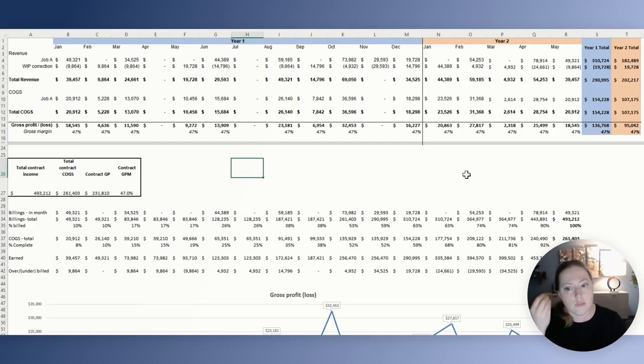That's what the work in progress adjustment is adjusting for, to truly reflect what the margin really needs to be. Obviously, if the cost goes super high, the margin is going to be adjusted because the cost is higher. And that's going to be when you have reached 100 plus percent of completion for that particular job.